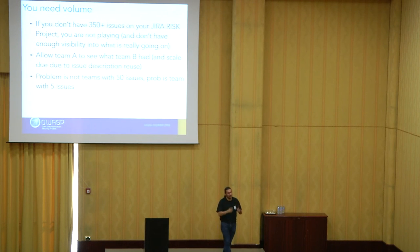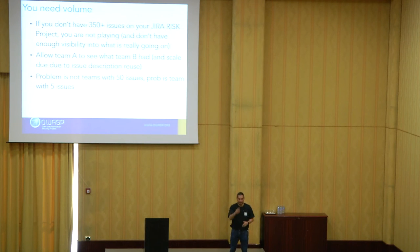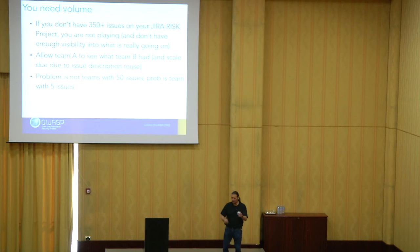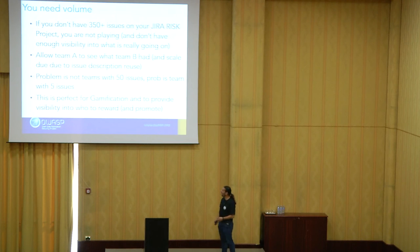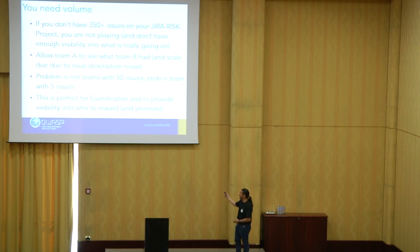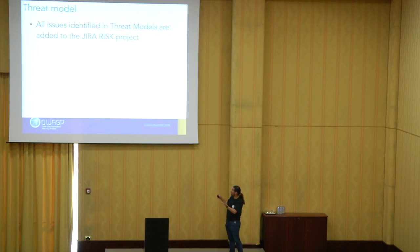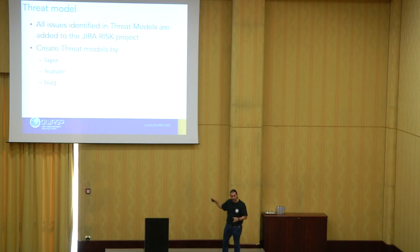Your problem is not the team that has 50 issues and is working through them — your problem is the team handling highly critical stuff with zero documented risks. When you ask them if they have any risks or worries, they say, 'Nah, it's all cool here.' But that asset is really important to the company — how come there's no awareness? Teams with no security risks are usually the ones where you find the OWASP Top 10 on them. That's why you need volume. This is also perfect for gamification — you can reward people who find more stuff and send devs to conferences.